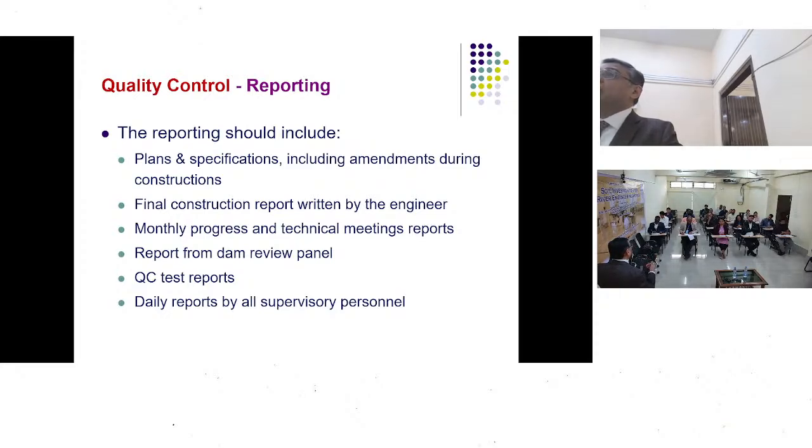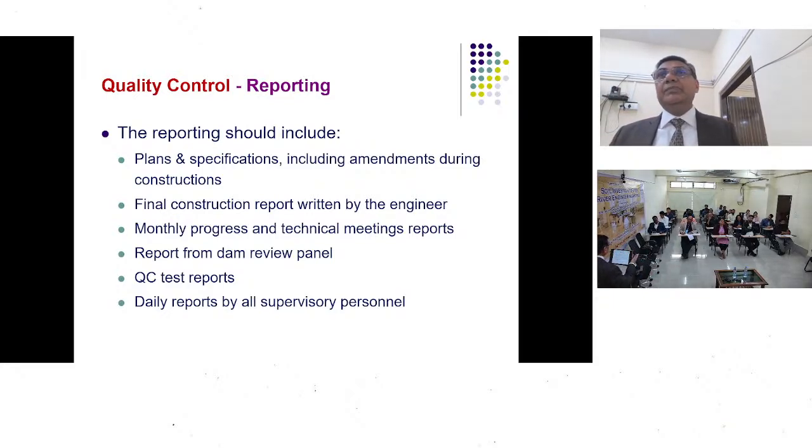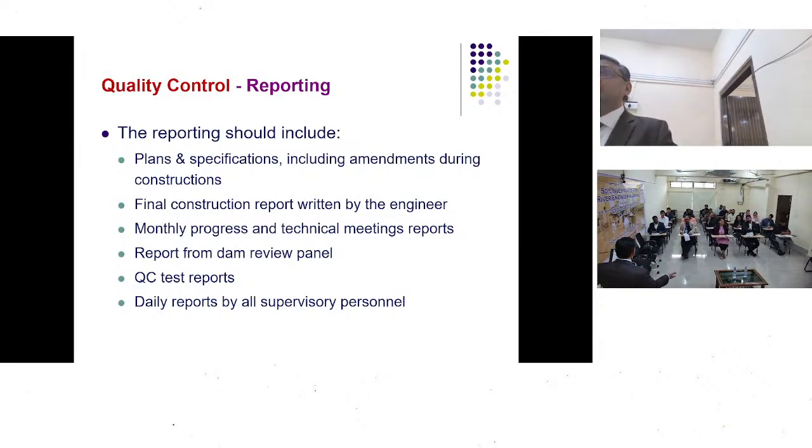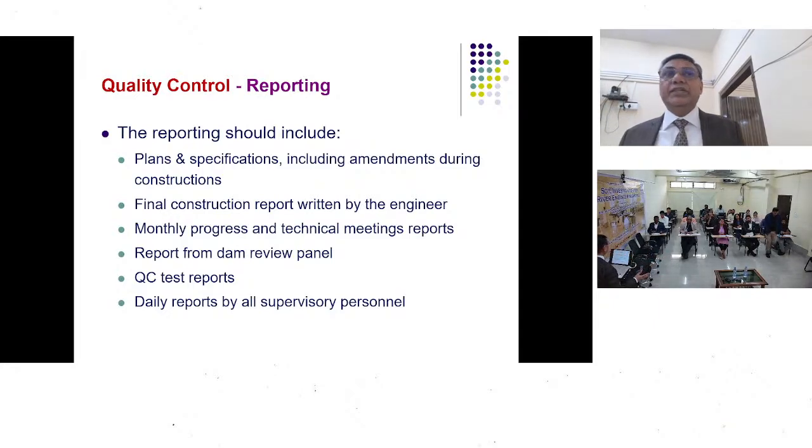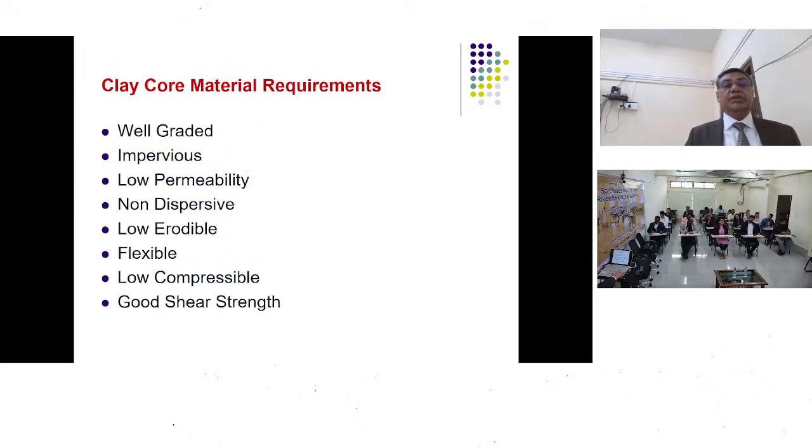And you are now doubting your engineering judgment. That after 30 years of my experience, how is it that I am not able to judge this problem and give a solution which should work here? The error was only a very simple thing, that the drawing which was used for construction was not kept in the record. Very small thing, but having very big implication. And technical meeting reports, report from dam review panels, QC test reports, daily reports by all supervisory personnel.